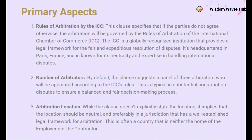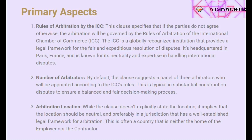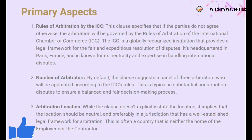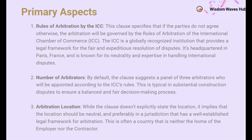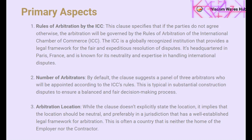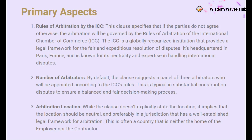Now let's look at some primary aspects that govern the arbitration process under Clause 20.6. Unless the parties agree otherwise, the arbitration proceedings will be governed by the rules of arbitration of the International Chamber of Commerce, ICC. The ICC is a globally recognized institution headquartered in Paris, France, known for its neutrality and extensive expertise in resolving international disputes. By default, the clause suggests a panel of three arbitrators appointed according to the ICC's rules, ensuring a balanced and thorough decision-making process. The clause implies that arbitration should be held at a neutral venue, typically in a jurisdiction with a well-established legal framework, often a country that is neither the home of the employer nor the contractor.